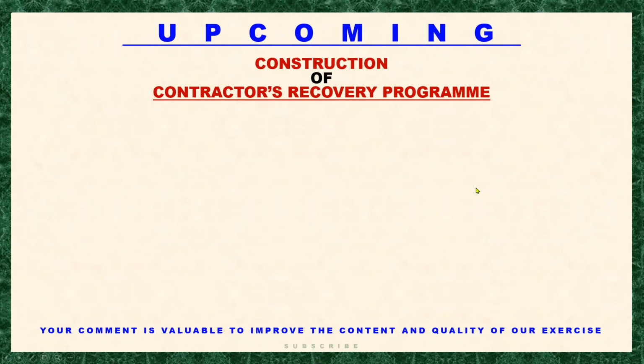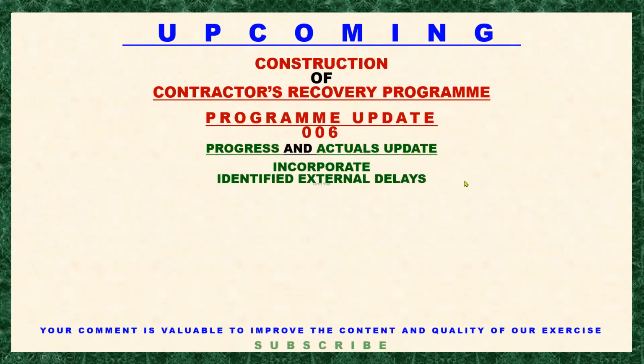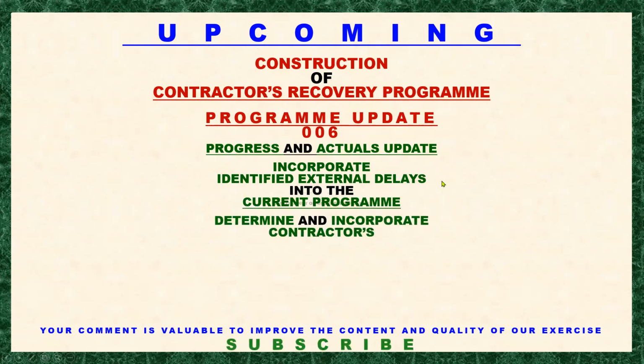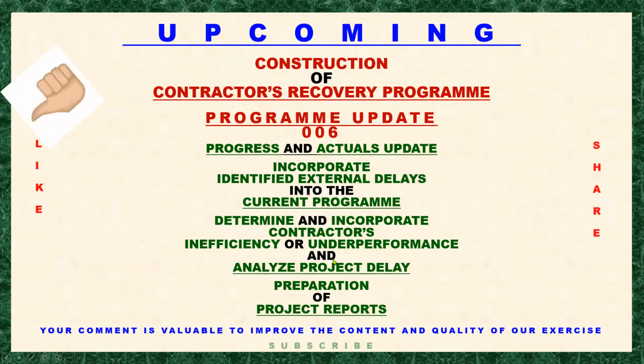So after the next episode, we will be working on this construction of the Contractor's Recovery Program. And the next is program update 006: progress and actuals updates, incorporate identified external delays into the current program, determine and incorporate contractor's inefficiency or underperformance, analyze project delay, and preparation of project reports.